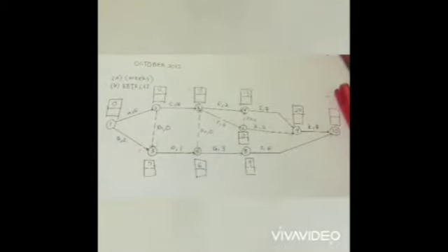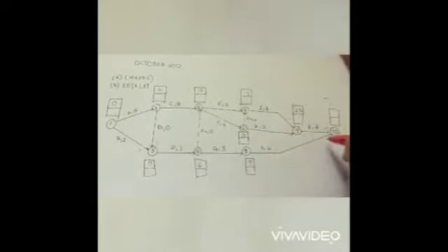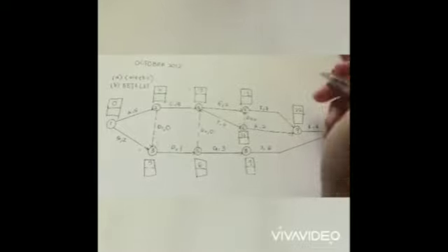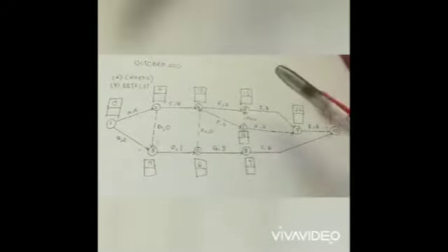And then the ending also there are 2 arrows. So 22 plus 4, 26. 9 plus 6 you will get 15. So between 26 and 15 you will choose 26. Okay, that's all for EET. Next, we will move to LET.